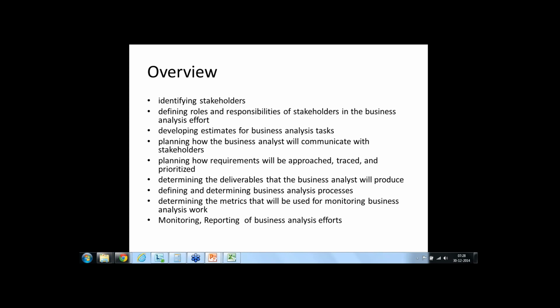You can call for workshops, have all the points discussed in the workshop, record them in minutes, and send them out to the stakeholders. That's one way of having the clarifications cleared. When you are in a position to have a workshop of all the stakeholders, that's more beneficial because it gets some of the privileges of Agile, so that your queries are clarified then and there.